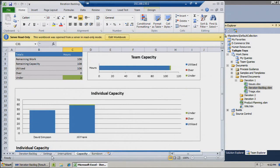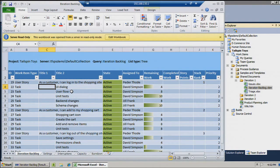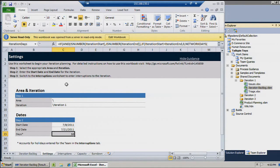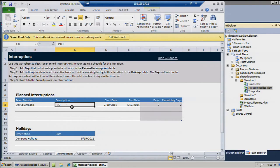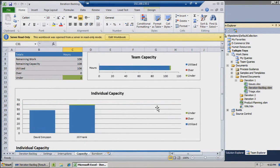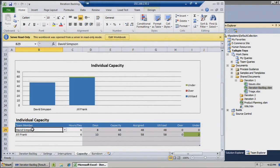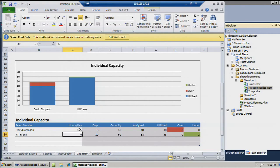Here's the Agile planning workbook. On the first tab you have the same hierarchy view, simulated in Excel with conditional formatting. You can set up iteration start and end dates, the iteration path inside TFS, and plan interruptions for capacity planning — like David taking two days PTO and a company holiday. It then uses data from TFS to show capacity by each team member and the whole team. You can reassign work and see if someone becomes over-allocated.